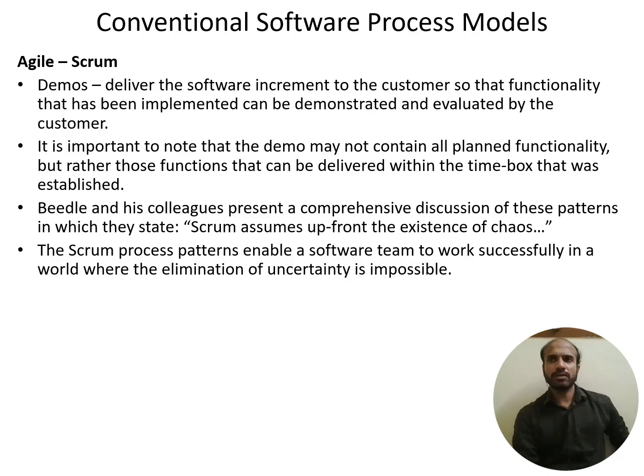And from there, it will be taken up according to priority. It is important to note that a demo may not contain all planned functionality, but rather those functions that can be delivered within the time box that was established. This time box for every feature or functionality will be decided in the initial stage.